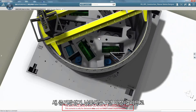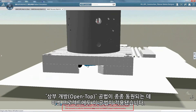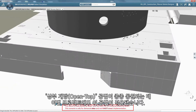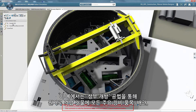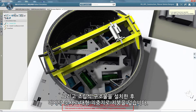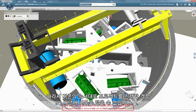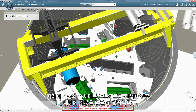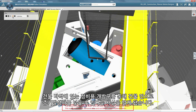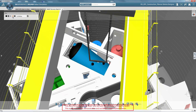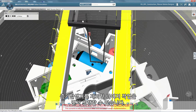New SG delivery takes more than one year, so in order to minimize the impact, the construction schedule needs to be changed. In today's nuclear power plant construction, open top methodology is often applied to reduce the construction schedule, and that is applied for this project as well. Here you install all major equipment items, piping and structures in modules into the reactor container building through the open top, and then put on and close the roof at the end of the sequence using a very heavy lifting crane. However, we found that the steam generators could be brought inside the container building through the maintenance opening at the bottom of the building using the polar crane installed inside the building. If this works, we can proceed with all the other work except the steam generators without waiting for their refabrication and close the roof as originally planned.